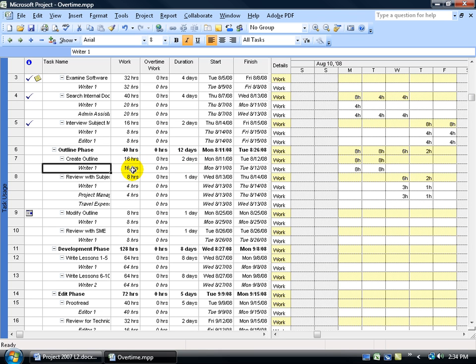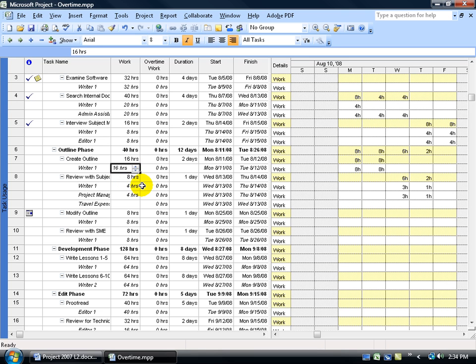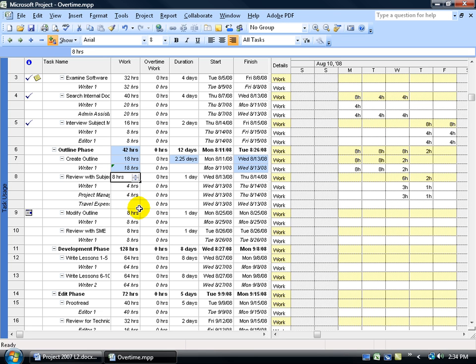You're looking at this and saying he doesn't need any overtime because the typical workday is eight hours. Well, if I get some feedback and find out that the Rider is going to take an extra couple of hours here, I can come over and increase his work hours by two, click off in a blank area and notice all the cells that are affected. It increased the outline phases total hours from 40 to 42. More particularly, notice the duration goes from two days to two and a quarter.